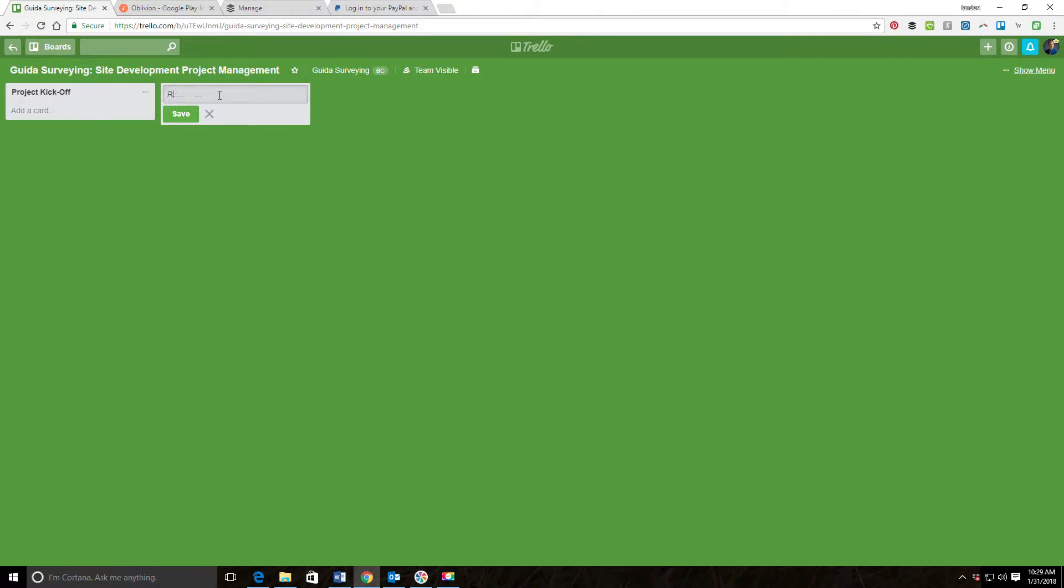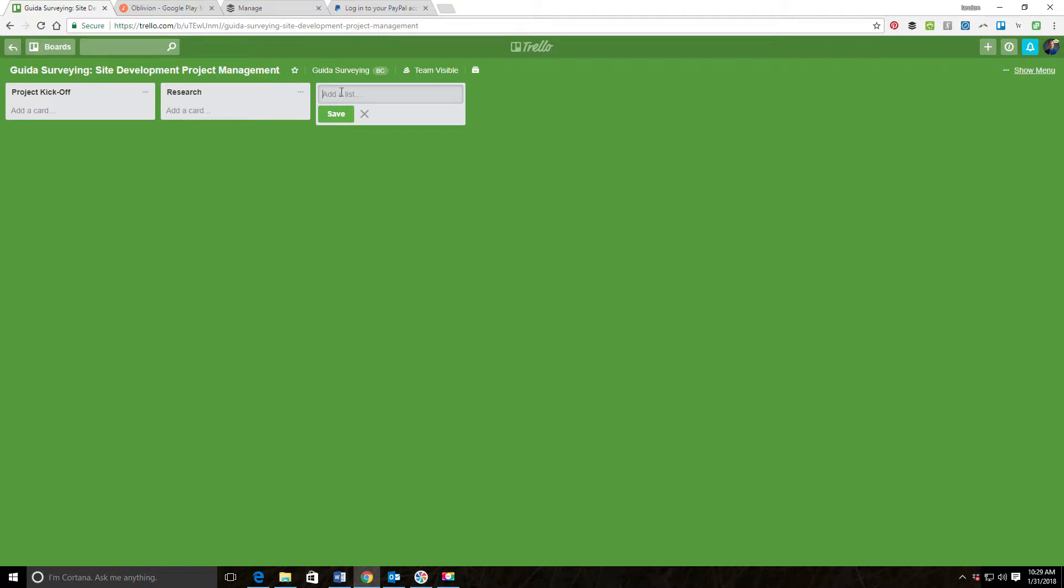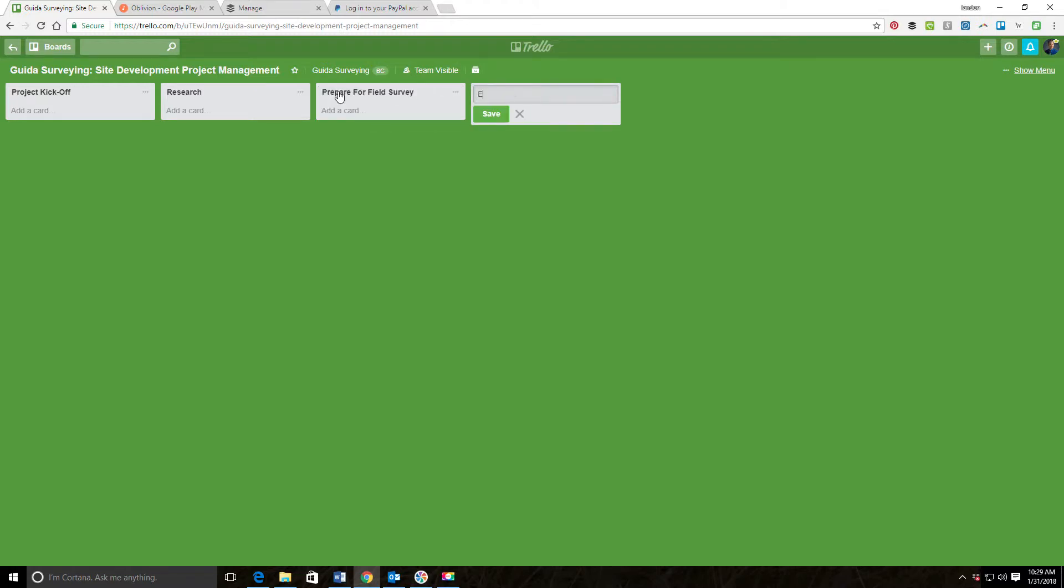Usually the next thing we do is there's some research. After the research, usually before we can do very much, there needs to be a field survey. So the next step is Prepare for Field Survey, and then we're going to execute the field survey.